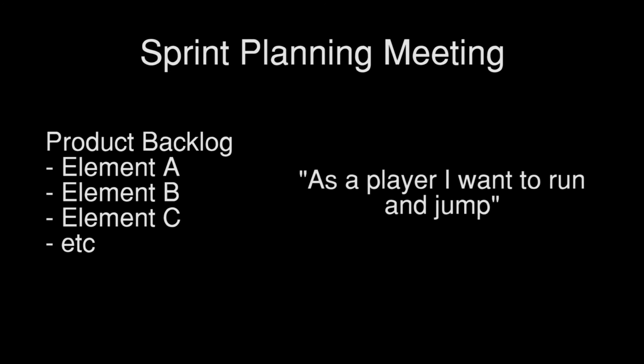Your very first Scrum meeting will start by, if it doesn't already exist, developing a product backlog, an artifact which lists and sometimes prioritizes the most important elements of your game. Often it is useful to derive backlog elements via the use of player stories, or some technique of understanding your target demographic. You will then, as a team, decide upon and extract elements from the product backlog to work on in your very first sprint.